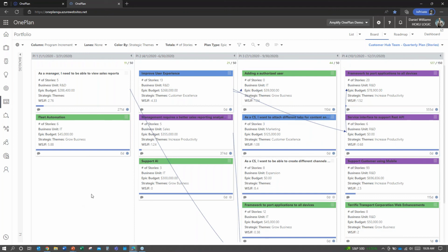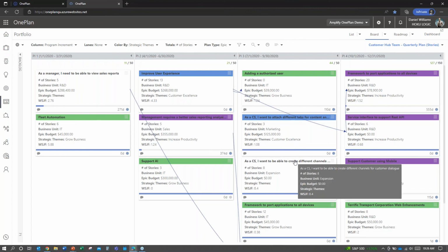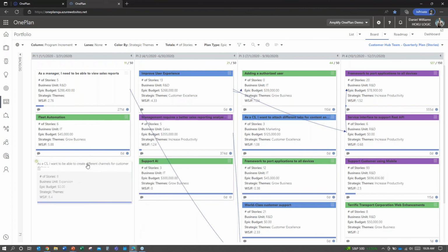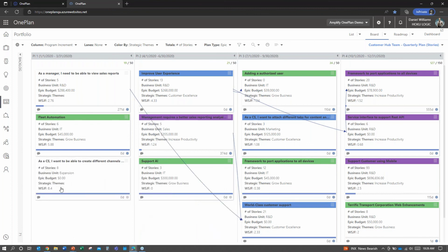But you can see in this example, I'm also in budget or in capacity limits. And in fact, I've got so much capacity in terms of work now for Q1, I could also consider looking at other things later and bringing them forward. You know, the things like this with a higher WSJF score, I can think about bringing forward because I've got capacity to do so. So now I can shuffle things around to meet that story capacity or story points capacity.